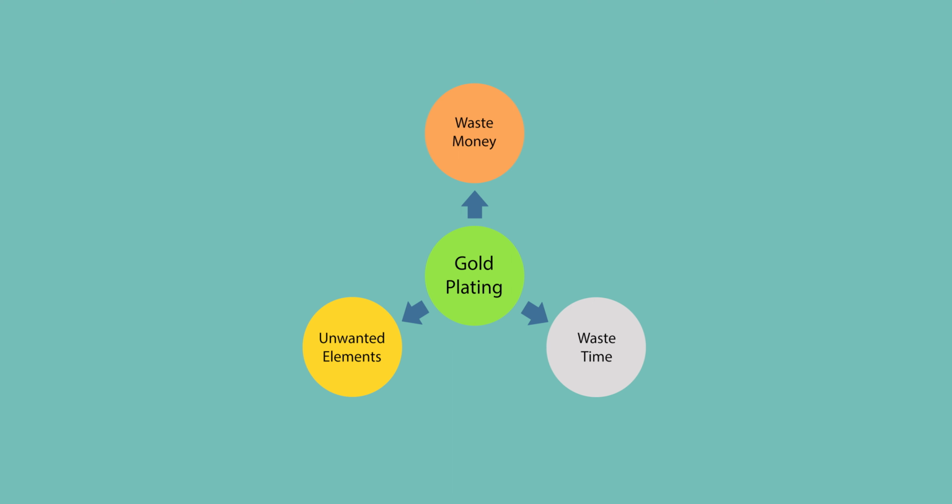The problem that is presented when we over-deliver is that it can be perceived as gold plating. Gold plating is really when we have monies left in the budget and we just burn those up rather than surrender those. It's not quality. Quality is conformance to requirements. And then we have this idea as well of scope creep. If we over-deliver, that can be perceived as scope creep, because this is what I was to create for this much money and this much time. Scope creep is those tiny changes, even if they're good changes, that we as PMs or our team perceive as good changes. It's circumventing our change control process, circumventing integrated change control. And so that can be perceived as waste, and we don't want that to happen.